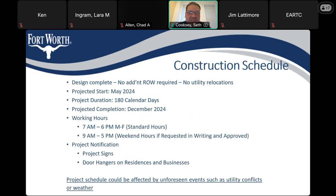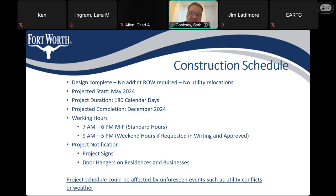What does the schedule look like? The design is complete and we're talking about construction. We're hoping to go to construction at the end of May — it could be early June. This project did not require additional right-of-way and there should be no utility relocations, which should help the project go smoothly. We're figuring it could be up to 6 months for this project, so we're looking at end of year or very early 2025 for completion. Working hours on this project are standard: 7am to 6pm Monday through Friday, and 9 to 5 on weekends if requested, required, and approved.